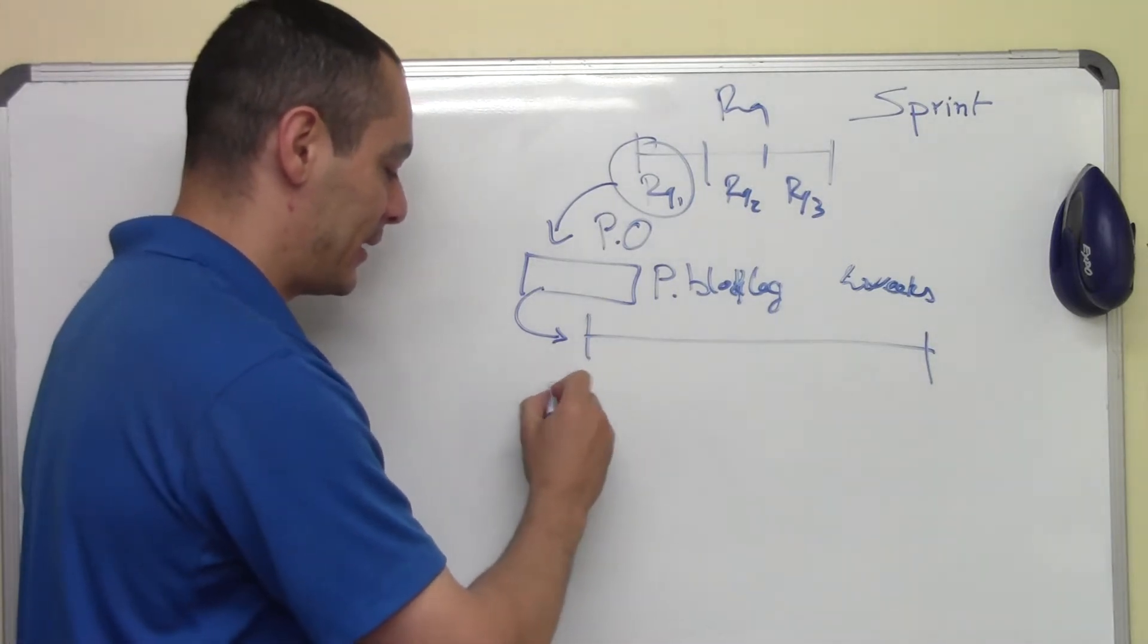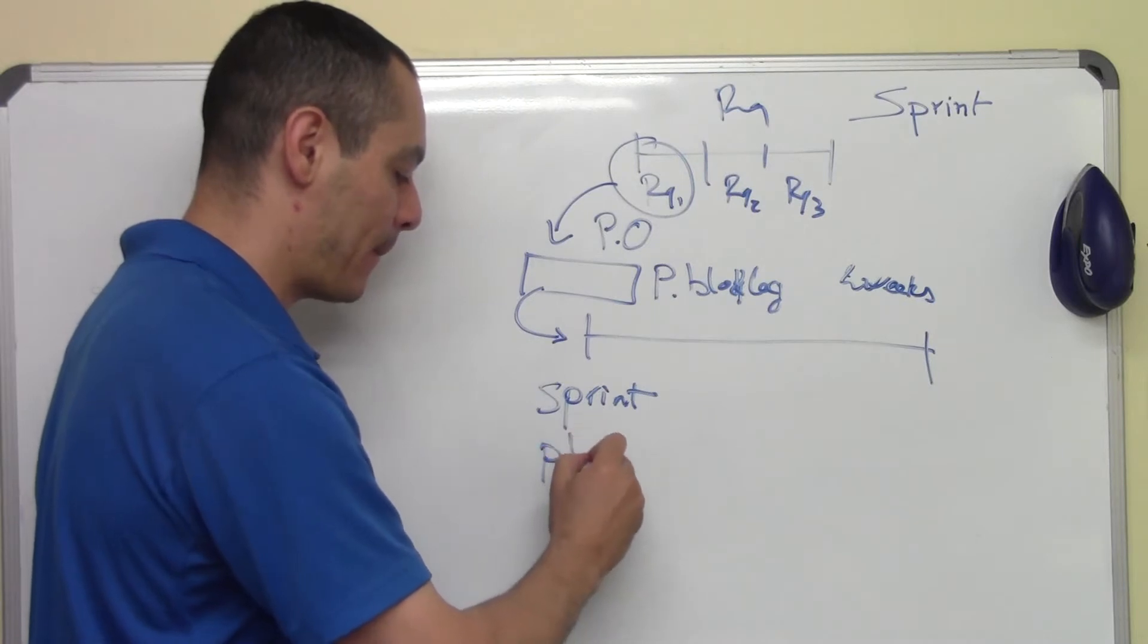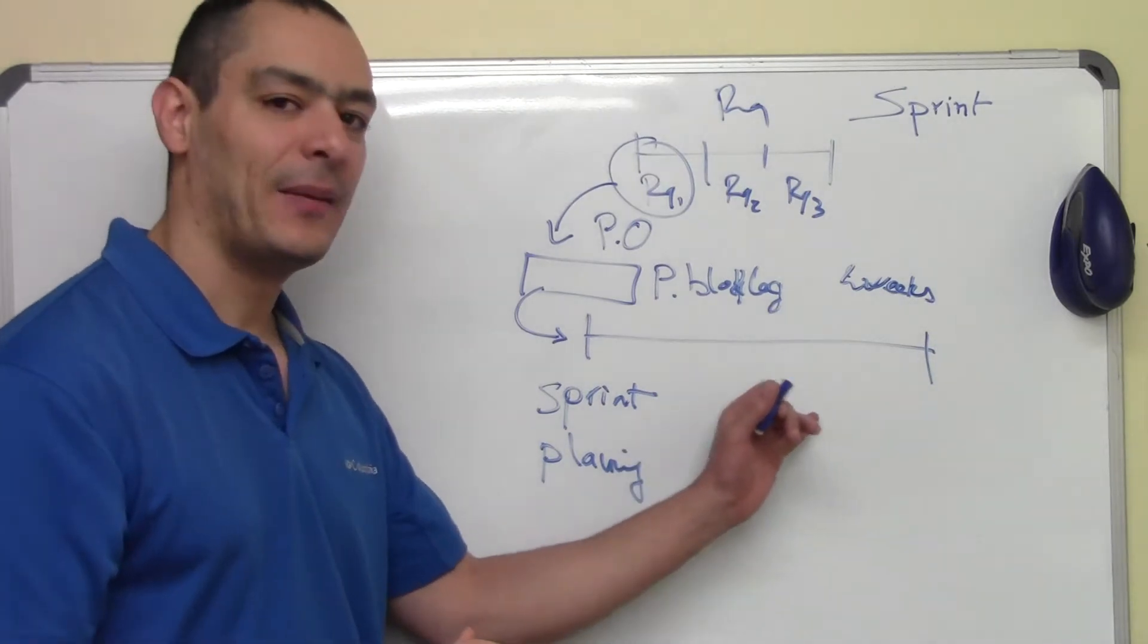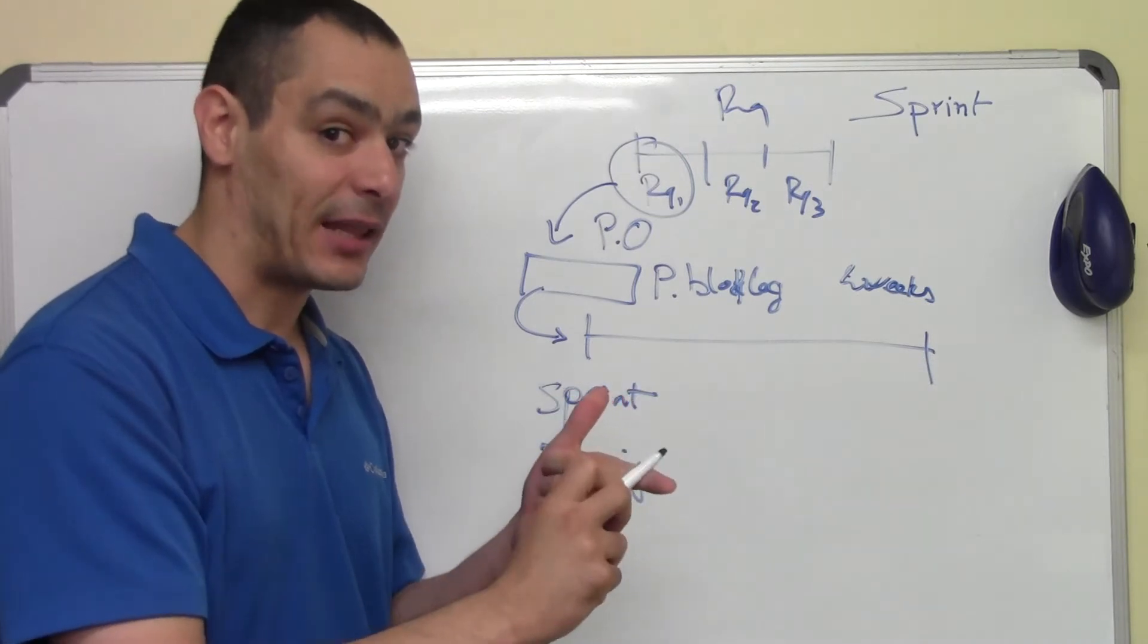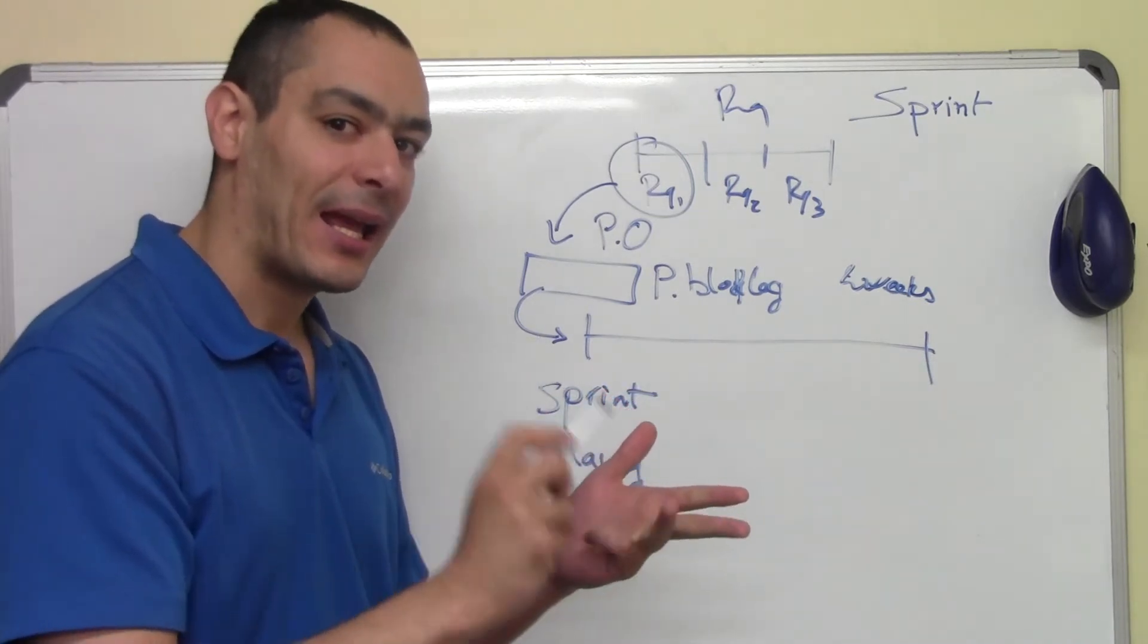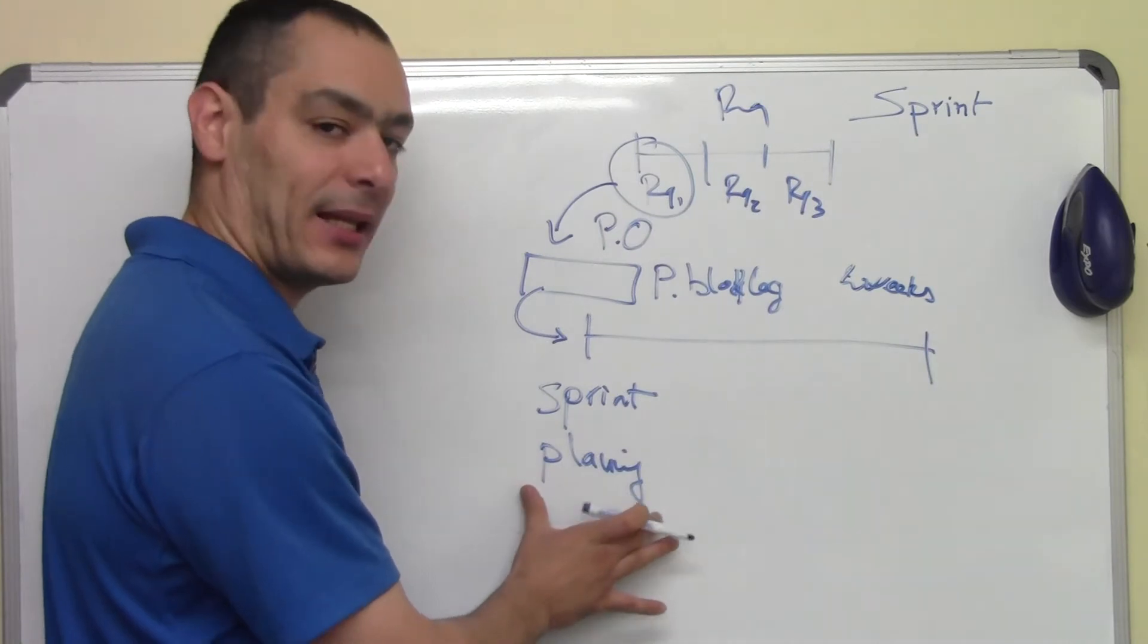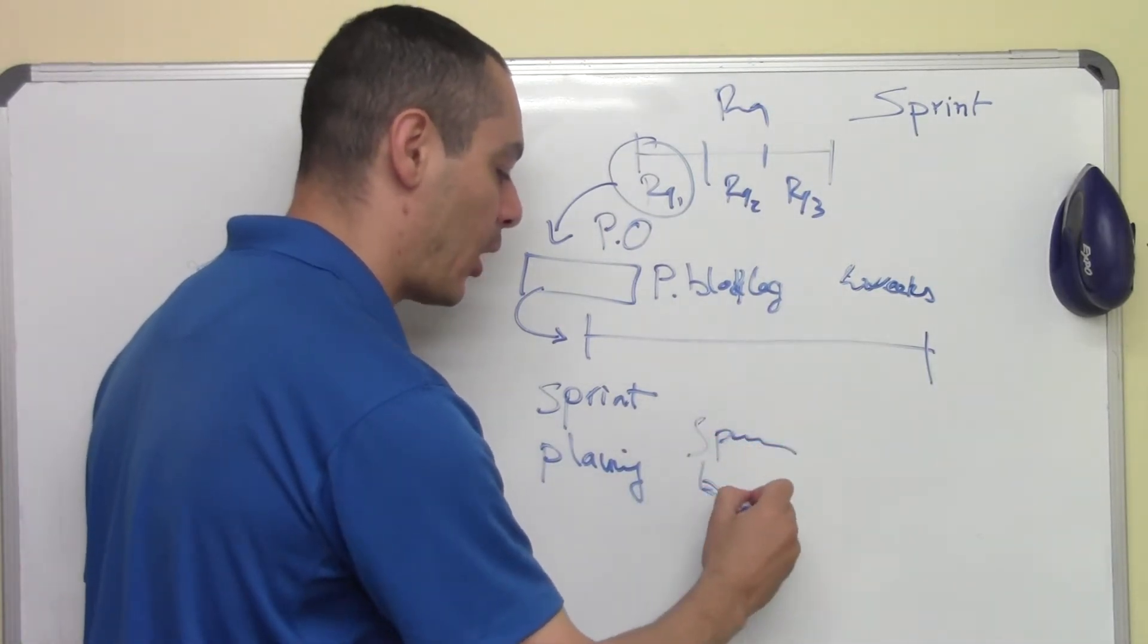The team will make the Sprint planning. The Sprint planning is basically just a meeting where the team is going to talk about how to make the tasks, clarify them. Estimate the time and make the commitment. And during this Sprint planning, they're going to make what we call the Sprint backlog.